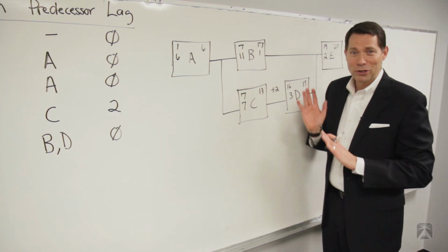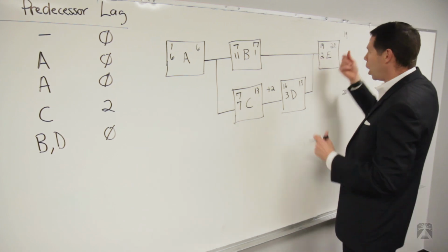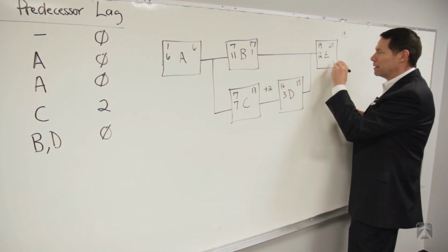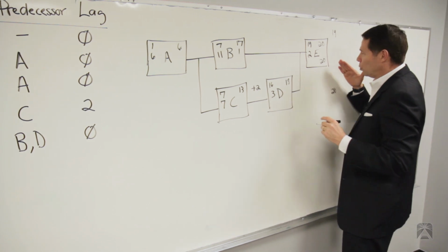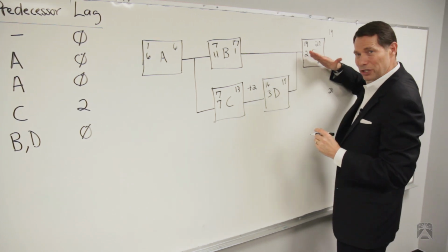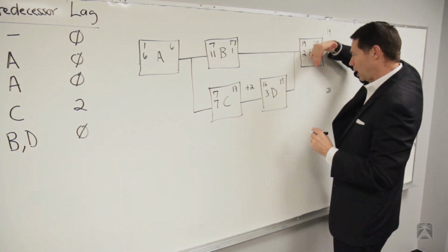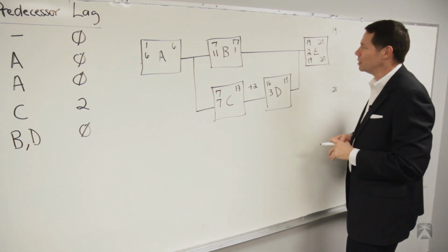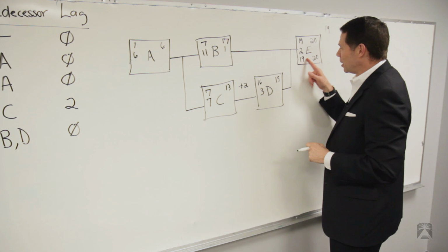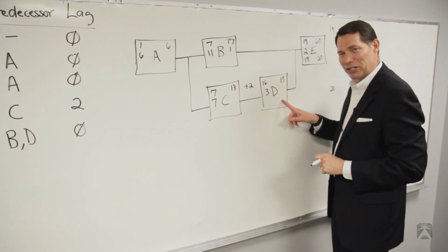That's the forward pass. Let's do the backward pass. All right, you take the longest one, which would be the 20, drop that down here. And remember what we do? We take this minus the duration, so 20 minus 2, it's 18, plus 1 at the 19. Okay, that's cool. Now, the latest I can start that's 19, so what's the latest I can finish this?